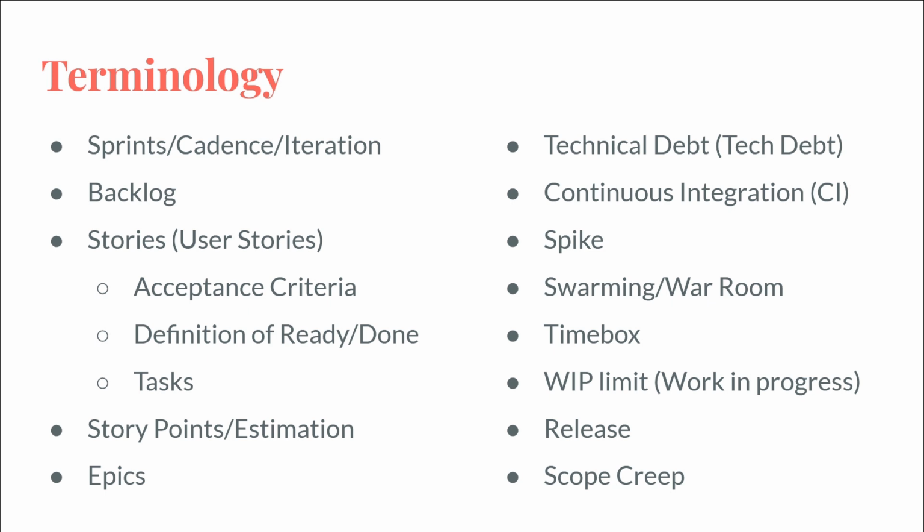And that's a way for a product manager or a project manager to look and be able to estimate how long it will take to get something done. They can look at an epic and say, this epic has all of these stories in it, and we pointed all of those stories, and that is going to take 120 points. And we usually get through about 40 points per sprint.